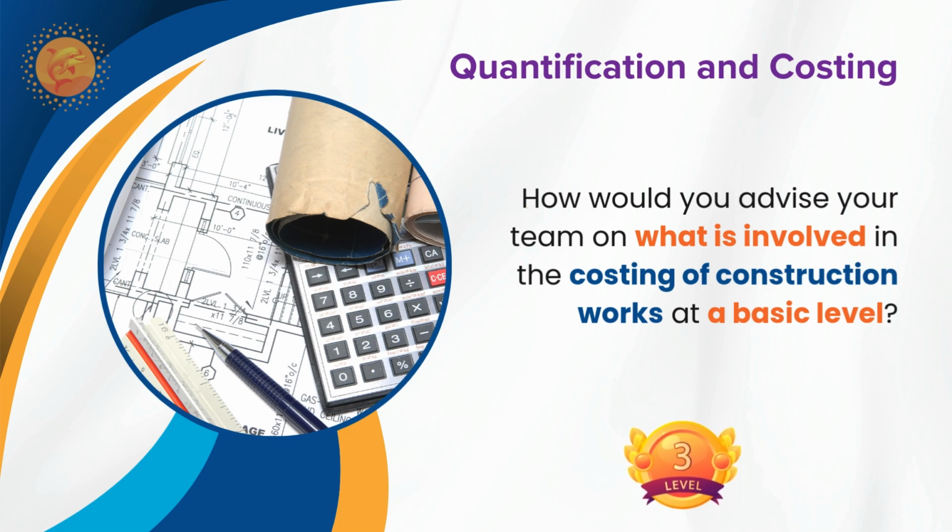All these things you have to adjust, so it becomes impractical to use those data. So that's why usually we don't use them. In Oman we are using only in-house historical data quoted for similar projects or currently executing projects of similar nature.